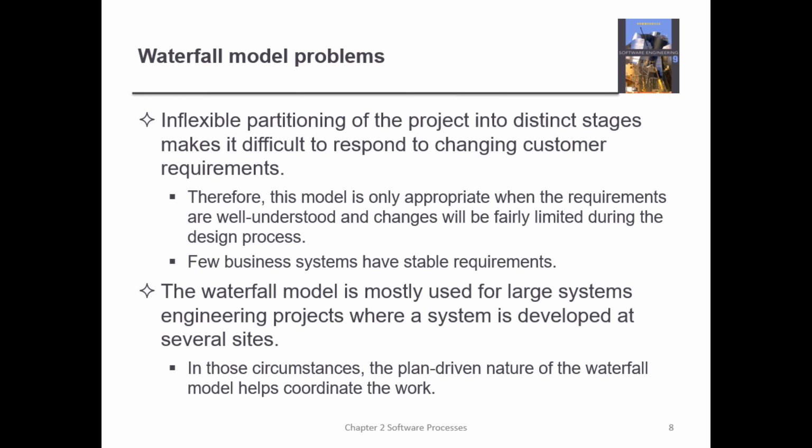Therefore, this model is only appropriate when the requirements are well understood, meaning there won't be changes, or maybe very limited changes, during the design process. Due to this, few business systems have adopted this model, because few of them have stable requirements anyway. Most of these businesses have changing requirements.